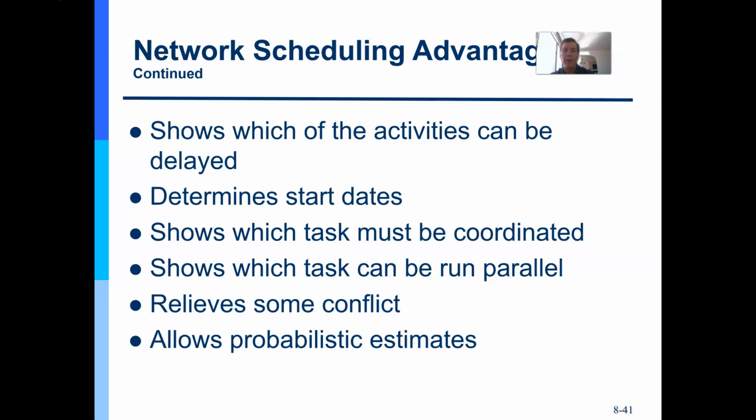Notice the bottom one, though, right? I need probabilistic estimates. I need estimates that are not padded, that are accurate. And just like in cost management, I want my people doing the estimate. I want them giving me a basis for their estimate. Tell me why you determined that, so I can make sure there's no fat in there, and I can compare it to lessons learned later if it was off.